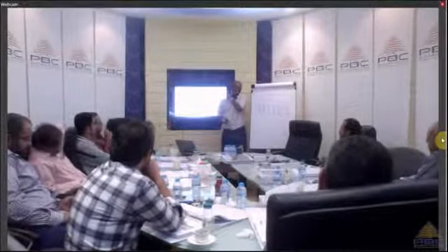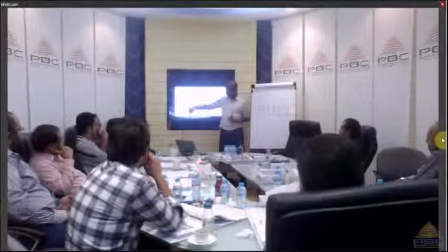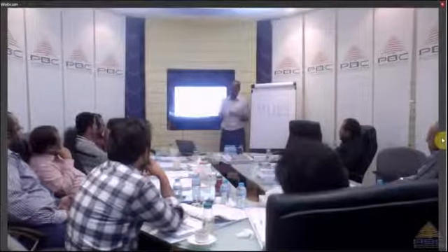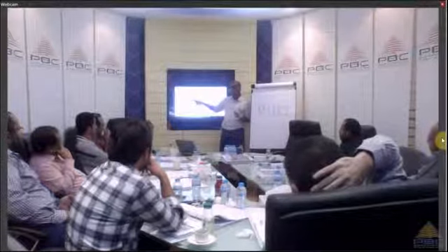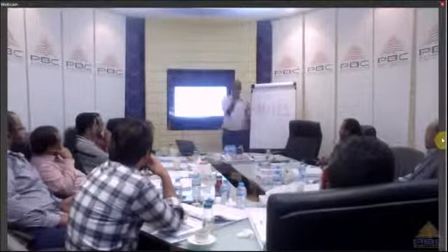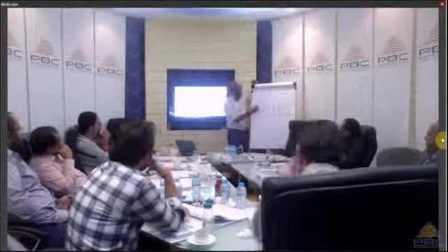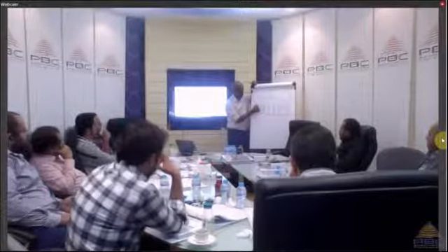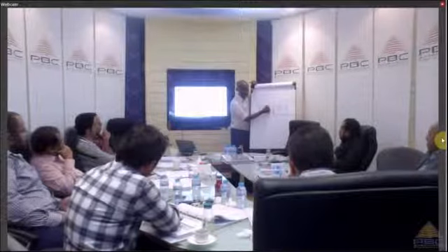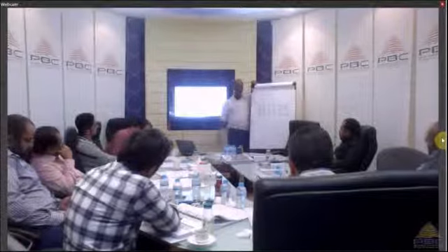Maybe the most challenging one to visualize is the start to finish, because the start to finish is basically a reversed finish to start. Now, all you need to know about this is the four ones and how do you translate them graphically in terms of the diagram. So, a finish to start, we link the two boxes like this. We start from here, finish A to start B. So, that's a finish to start relationship.